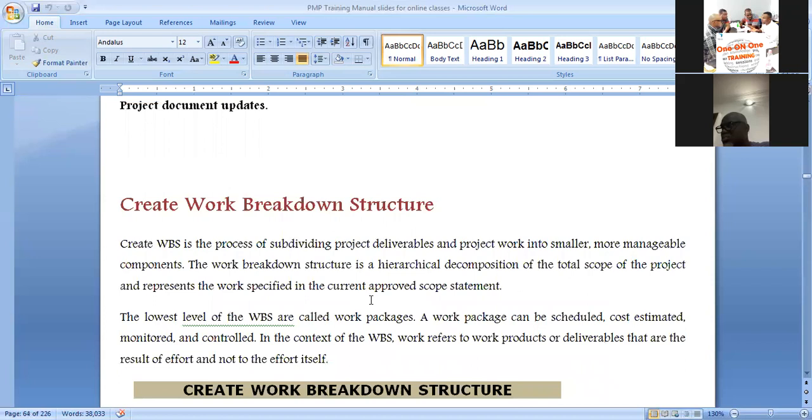You are breaking it down like the construction of a 3-bedroom bungalow. What would we do first? We carry out site preparation. As we are carrying out site preparation, we may want to carry out procurement. And also foundation is part of it. And after the excavation, we place the substructure and we move on to block work. After block work, we place the trusses on top of it, the trusses that will carry the roofing sheet. Look at all this, we've decomposed it into smaller, more manageable components.